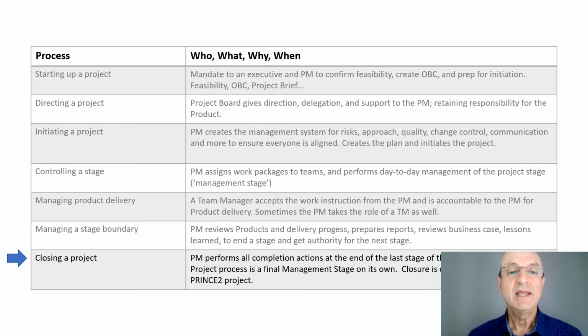However, you might need to get to the end of that penultimate stage in order to get the board to sign off that everything that needs to be done has been done, and to authorize you to go into closing the project, and therefore closing the project becomes a final management stage in and of itself.